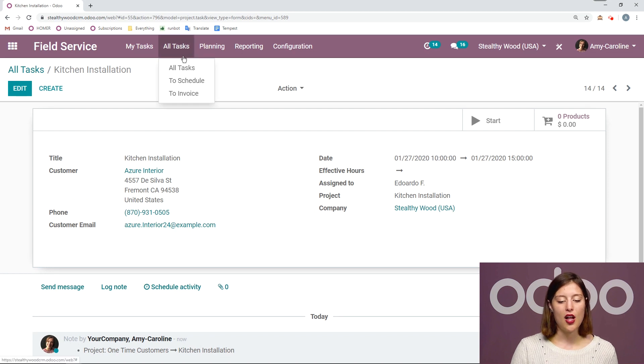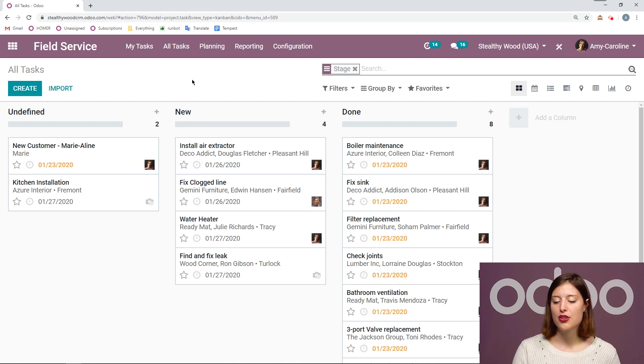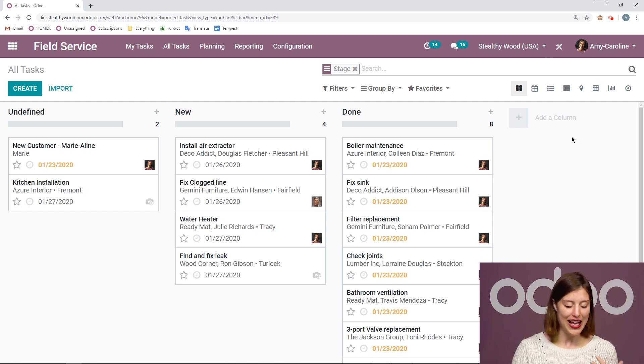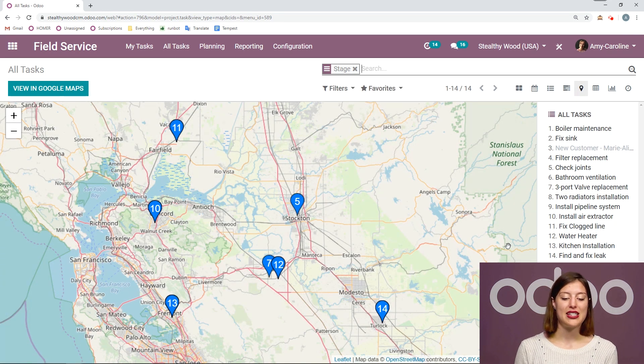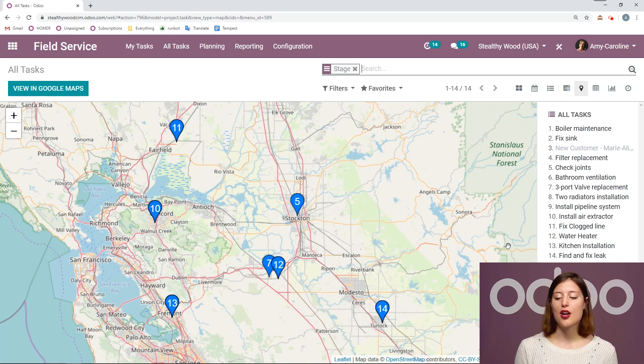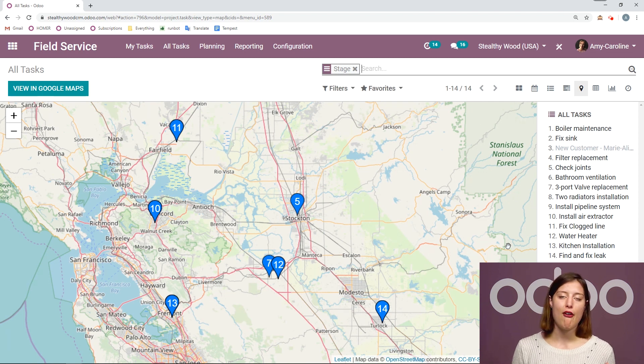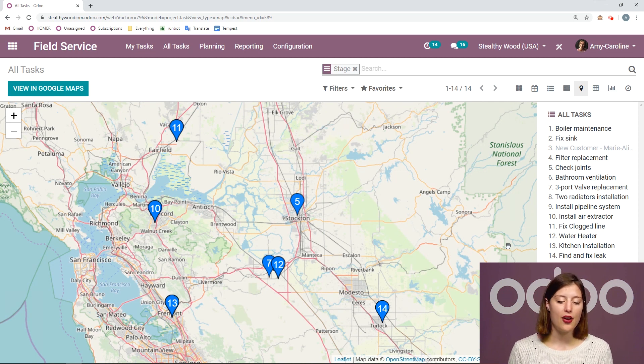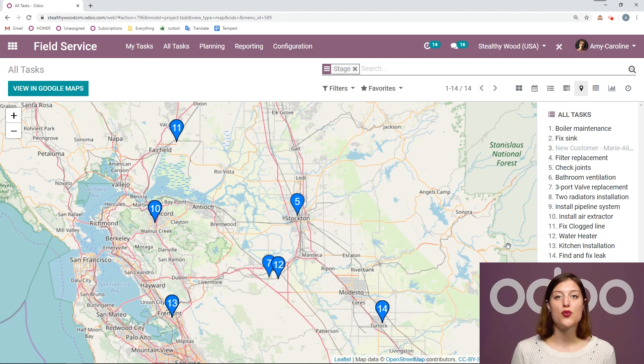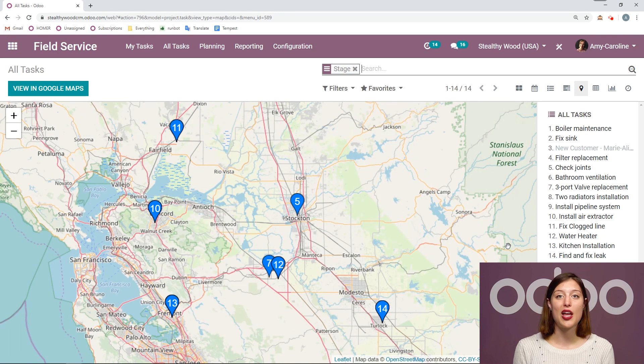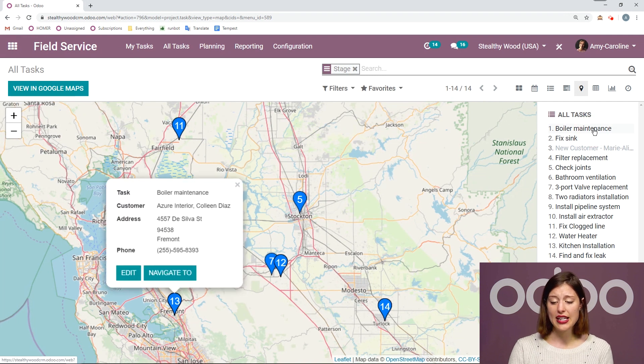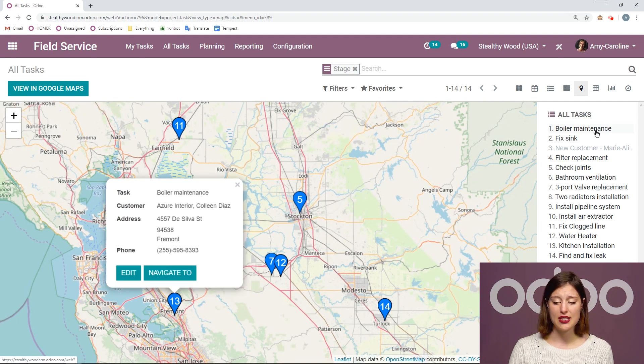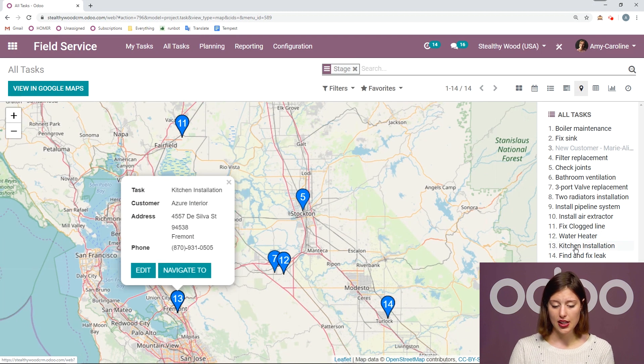And if I want to look at all of my tasks, I'm not just going to have this Kanban view or a list view, but something that is so cool and so convenient, as I can see what's going on on the map. I can see where all of my tasks are. This is really cool. Because for example, if I have multiple installations or multiple jobs in the same area around the same time, roughly, I can assign one of my workers to all of the jobs that are in the same area. So that will avoid a lot of commute time. And so I have a view here. And then I can click on the specific task. So let's go to the one we created actually, kitchen installation.